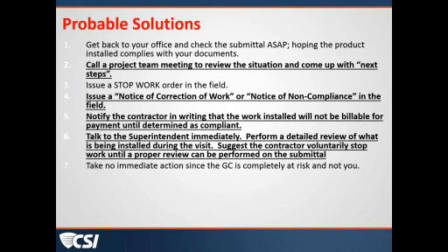On this slide, when you look at item number 4, issuing a notice of correction or a notice of non-compliance, I think we need to distinguish here, and Jim, I might be getting ahead of myself, the difference between work that is in non-compliance and work that is defective. You're out there, the waterproofing's going up, you see it, you don't know whether or not the waterproofing is the correct product.